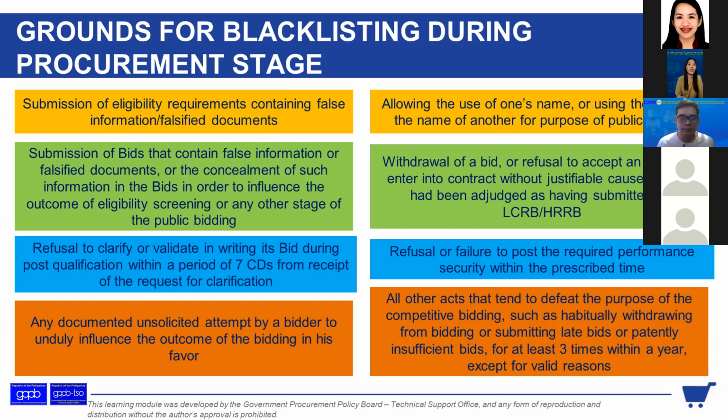So, withdrawal of a bid or refusal to accept an award or enter into contract without justifiable cause after he has been adjudged as having submitted the lowest calculated responsive bid for infra and goods and for the highest rated responsive bid for consultant. So, pag hindi ini-accept ang award or hindi siya maka-enter into contract dahil hindi siya mag-post ng performance security niya or hindi talaga siya magsiset kailan siya pupunta para pirmahan yung contract niya without justifiable cause, then that's a ground also for blacklisting.